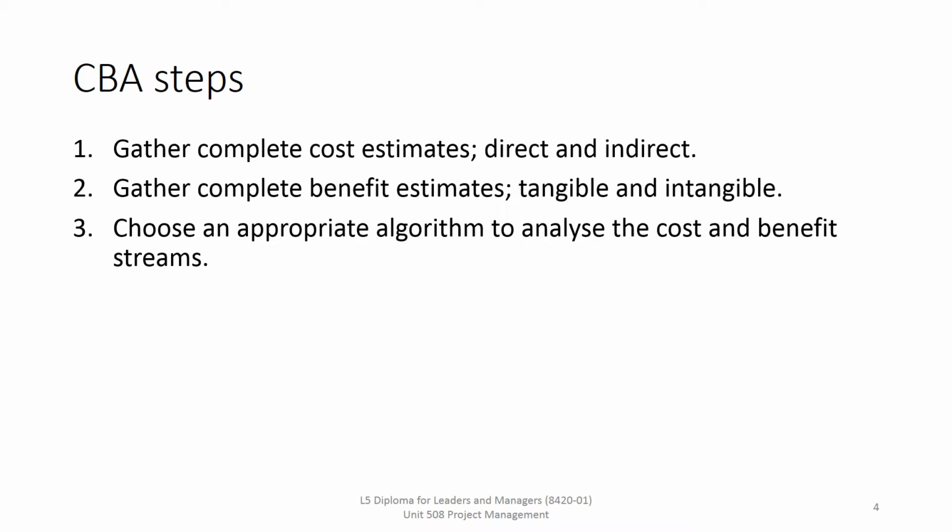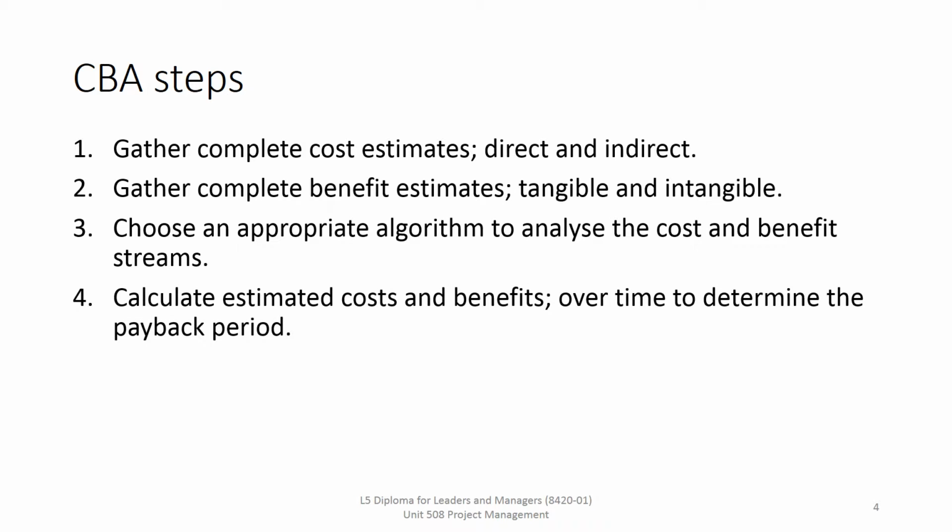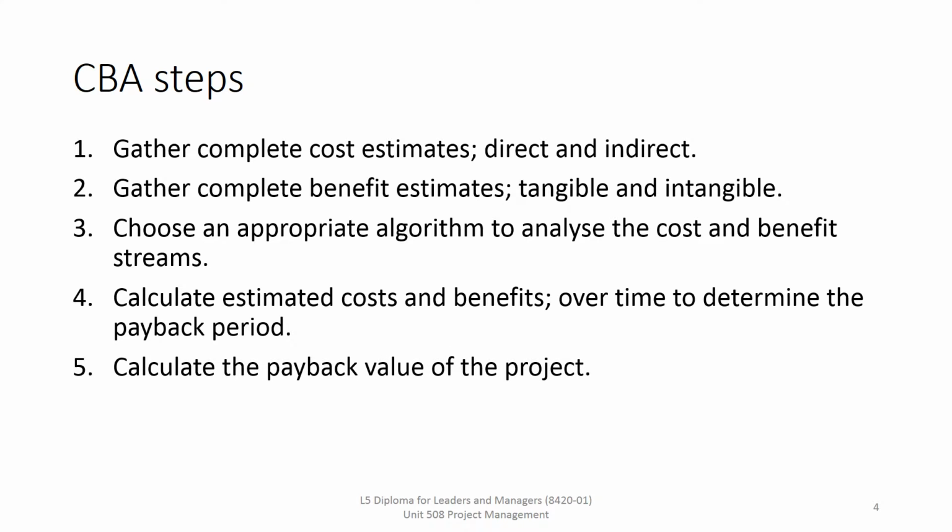Some algorithms are going to be about calculating depreciation or capital values, and it's going to depend on what your project is about, what your organization does. Step four, we compute estimated costs and benefits schedule over a period of determined payback time, and we'll talk about how we calculate that in a minute. And then we calculate the payback value of the project and make our recommendations. So a straightforward process really, but not as simple as it seems, and we'll look at some of the detail.